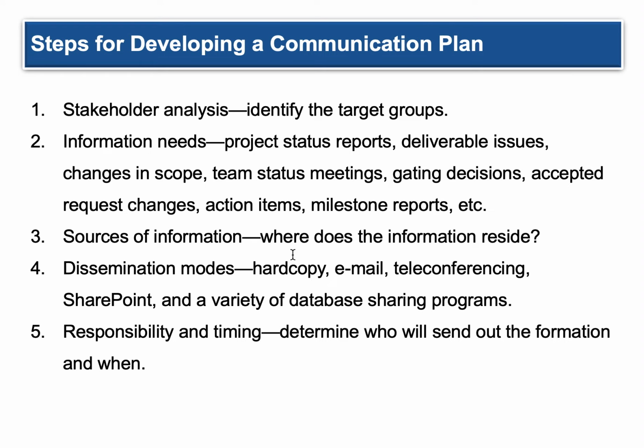Steps for developing a communication plan: stakeholder analysis, identify your target group. Information needs. What are the project status reports? What are deliverable issues? Changes in scope. Does something change as you get through there? Do you have regular team meetings? Are there gating decisions? We talked in a previous lecture about going through these gates before a project moves forward.